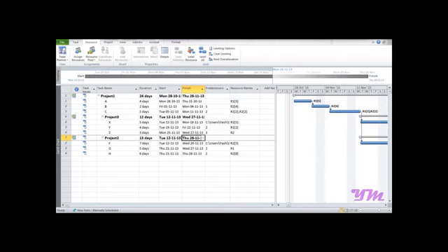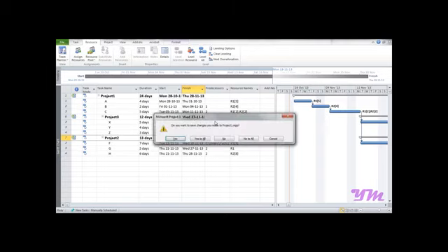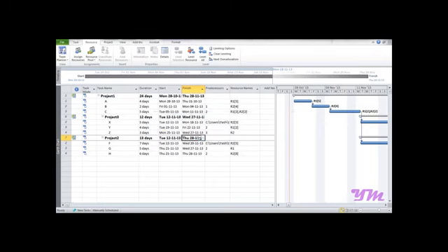Now we have connected the 3 project files with 1 resource file and finally clubbed all of them into one single file. So making a change in any one of the files will also make the changes in all the files. Let's see, if we just press save over here, it asks, do you want to save changes? We have the options yes, yes to all, no, no to all, and cancel. Whatever decision you make will be applied to all the existing files. So let's say yes to all. The changes made in this file have been reflected in all the files that are linked with this.